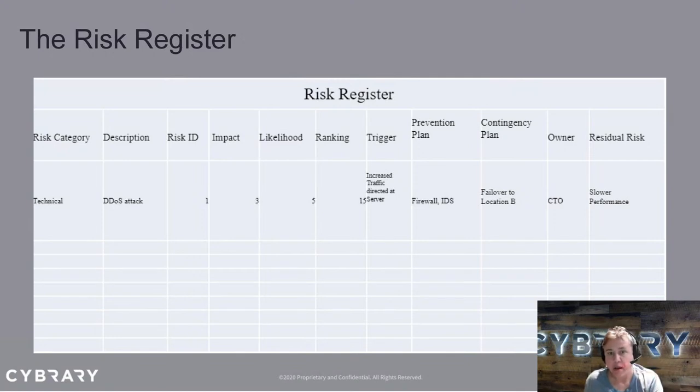So a risk register gives us a central repository. It's a place that we go to track risks. We have a risk meeting on a periodic basis, and we come in and we update the risk register. Individual owners are usually able to update and fill out a status category in relation to their risk. Let me just show you just a second here.